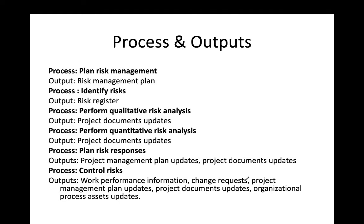Let's look at the outputs of each process. The first step is plan risk management — its output is the risk management plan. The second step is identify risk — this means studying what risks exist and what their positive or negative impacts will be. You then create a register for that information, called the risk register, which contains all risk-related information.